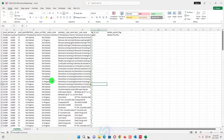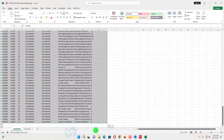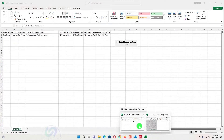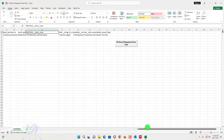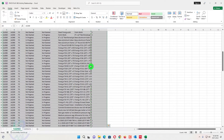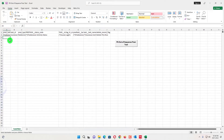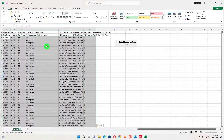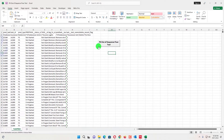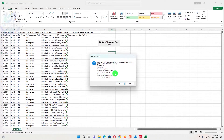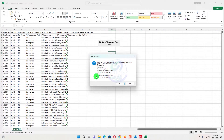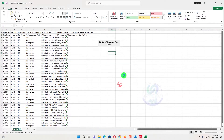Our task was to look for out-of-sequence activities. Select all the activities, copy them with Control+C, and paste them into the out-of-sequence tool. When you paste, all the activities will appear in the tool. There is a button for the P6 out-of-sequence fixer tool — just click it. It will say: make sure you have copied all the mentioned columns — predecessor, successor, relationship type, predecessor activity status, successor status, lag, predecessor activity name, and successor activity name. Press Yes.